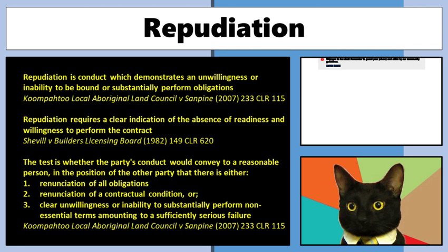All right, and you at this particular point get to elect to either terminate that contract at that point in time, or to keep it on foot and usually do things like find alternate third parties in order to get their existing contractual obligations completed.